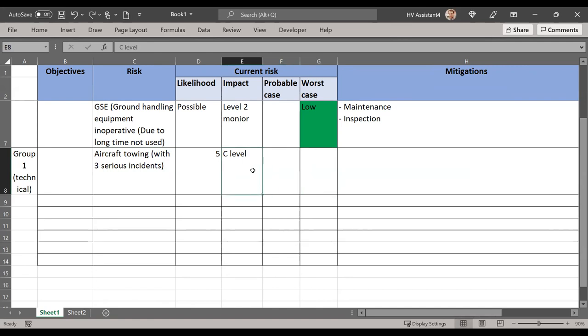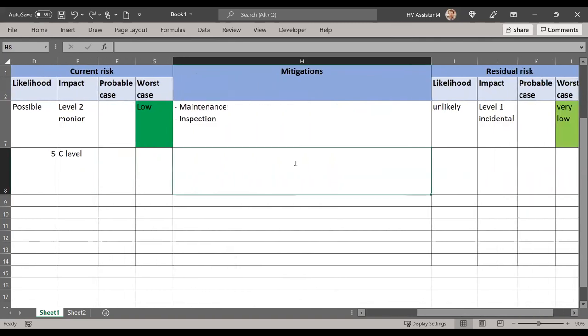After that, we take the following mitigation measures. The first, we revise the coordination procedure among involved parties. The second one, we add a number of safeguard personnel to protect aircraft in the parking area when it is not in operation, in the hangar and vehicle hangar. The last one, we install a number of warning lights on the tips of the aircraft wings.